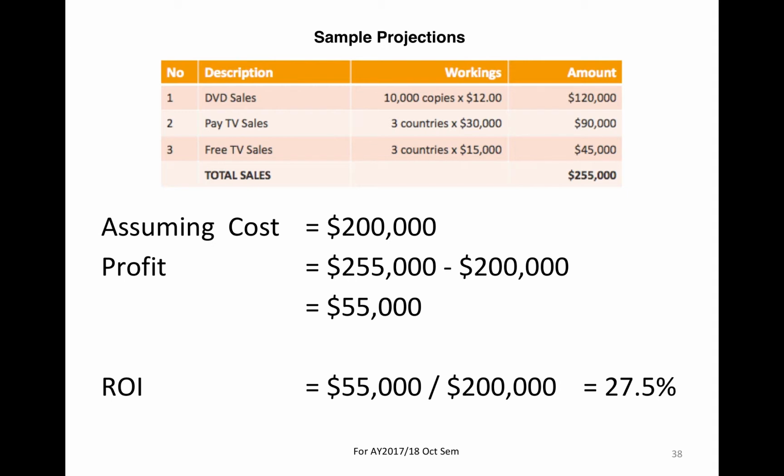Let's say you estimate it to be 4. What if you don't go to that particular store? You go to another store, and that store may sell you duck rice at $4 a plate. And then what if you have an extra crew member? And how many days of shooting do you have? So you have to actually factor all that in.